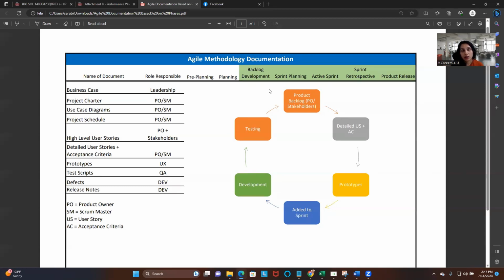But lots of times, in order for us to be ready to take things into the sprint backlog, your user stories have to be ready, so that when we take something in, our developers have enough information and knowledge about the user story in terms of documentation, so they understand what needs to happen as a result of that user story.